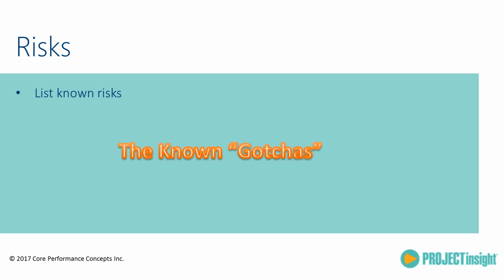One of the ones from our charter for the artists, what if the artists don't want to participate? What if they don't have the technical skills to participate? So if we don't get artist participation, we don't get 100%, that's going to hurt the concept, the feel of the community. And if the artist stuff isn't on their website, then their sales might suffer. So yeah, once you know what some of the gotchas are, then we can work toward the mitigation strategies.